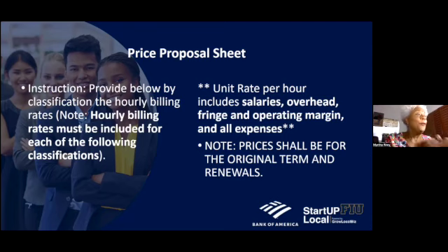But however, when I worked in corporate, before I left government, what we would do, for example, let's say your top consultant is the one getting 45. The way that the company would do it, you would come up with an average weighted rate for that category.